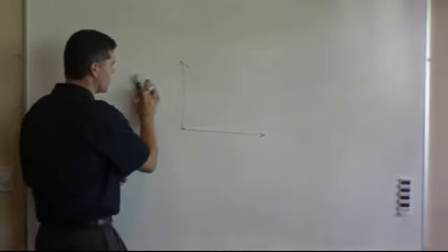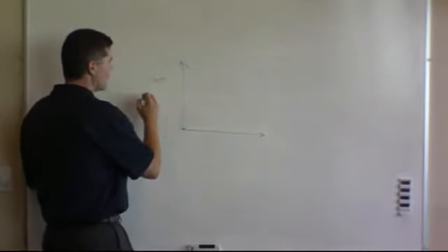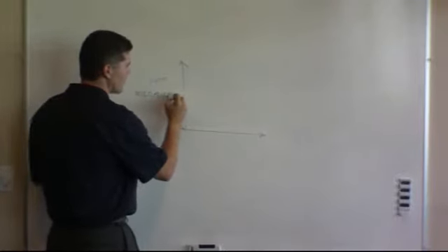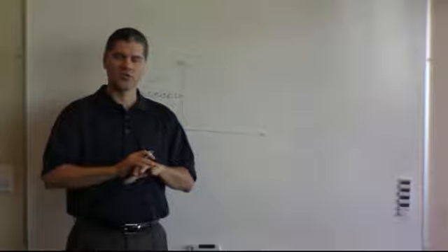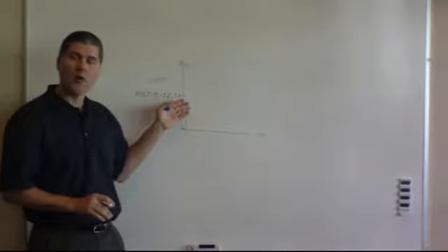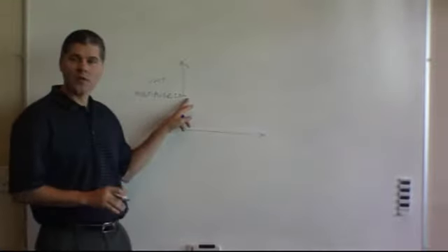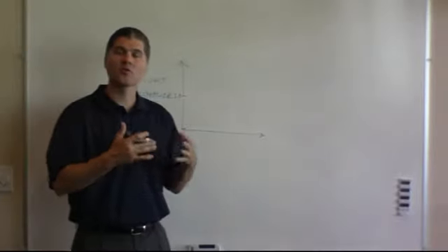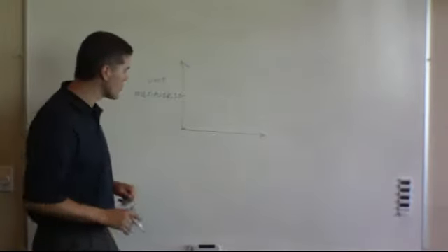Now let's talk about changing the number of resources. And what we call that is a unit multiplier. And there's our 1.0 value. So what that means is no matter how many resources you have assigned, we're going to take that as the base number. And we're going to create a multiplier on that base number. So if I have 4 people assigned to a task, when my multiplier is 1, it says use 4 people. If my multiplier went up to 2, it would say use 8 people. So it's multiplying that base number. If I started with just 1 person, that would turn into 2 people. So it's just a multiplier.